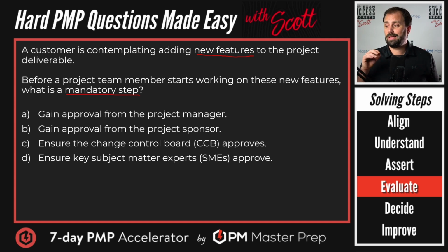All right, so gaining approval from the project manager. You may think like, I rule the roost. I'm the project manager. I can do this. No. It is not your responsibility once we've established a baseline. Your responsibility is to move the project through, to get the people moving, but to handle big changes that affect our baselines, it is not the project manager's responsibility to do that. It is not your purview or your authority, I'll say more correctly, to just say, oh yeah, good idea, let's do it, expand the project or shrink the project. No. So we are going to kill A. Don't like it for those reasons.